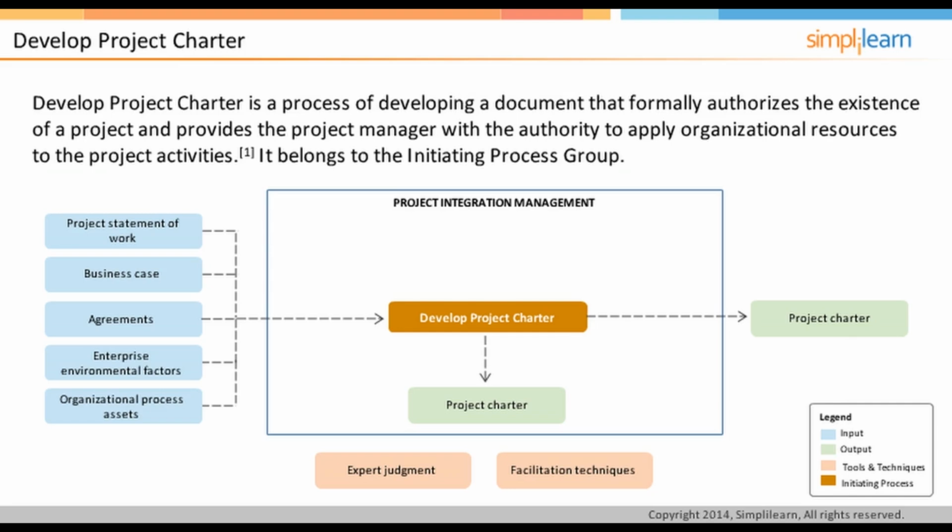It is important to point out that a project charter is not a project management plan. The detailed risk, schedule, cost analysis, etc. is part of the project management plan and should be done during the project planning phase, when there is more detail available to do so. The charter should be sufficiently high level to accommodate the minor changes that might arise in the project. In the next screen, let us discuss the second process under Project Integration Management, Develop Project Management Plan.